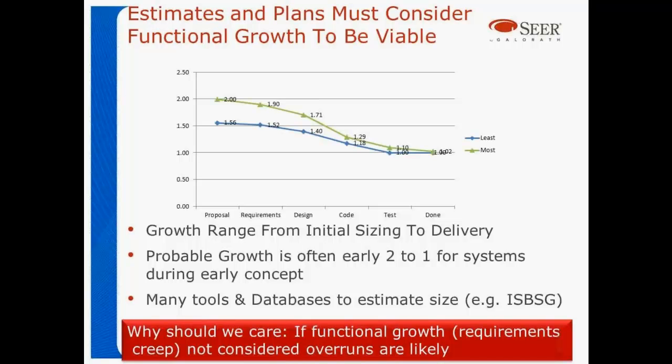And one of the other things to consider in looking at new systems, Lee talked about how requirements came in near the very end. Requirements growth is almost a sure thing. In this example, we can see that requirements can grow up to about 200% of the original requirements, oftentimes very early in the process. So when people are first conceiving things, it's probably going to grow dramatically.